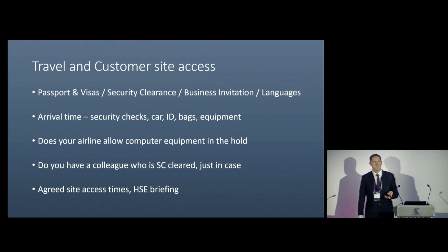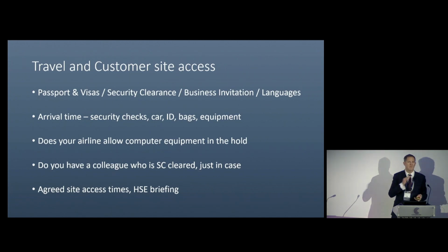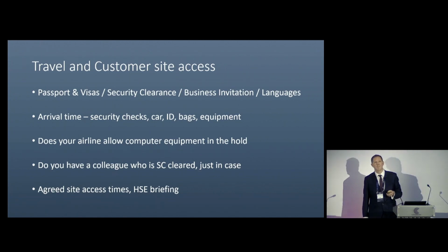I've mentioned site access times, and some sites, when you go on them, they ask you to do a health and safety briefing. Just because of the nature of their organization, you have to sit and do a video, so you have to take that into consideration when you're joining site, because that takes time out of your project.